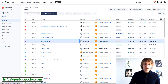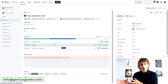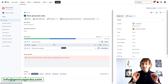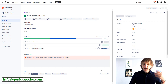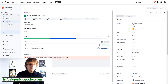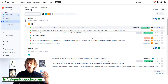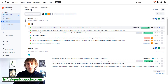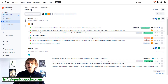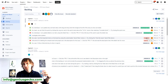The epic name is connected to the epic link because if you look at child issues on the board — let's go to the backlog — you will see that those issues have a label showing which epic they are connected to. This user story is connected to the developer epic, this one is connected to the user epic. So this is where the epic name comes into play. It is shown as this label. If you want to make it shorter so the label is not super long, you can have a separate string for the epic summary.